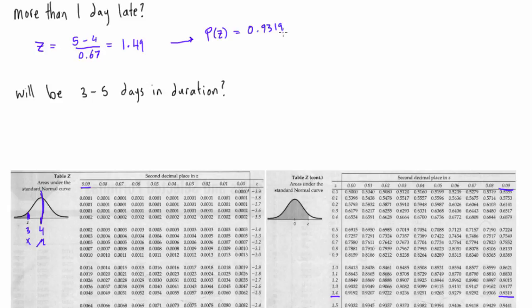Let's figure out what's going on. We're using a normal curve centered at 4 — that's our expected duration. X in our case is 5, which is one day longer, i.e., more than one day late. The z-score table returns the probability of landing in the shaded area. Multiplying by 100%, there's a 93.19% chance that the activity finishes in less than 5 days. But we need the probability that it finishes in more than 5 days.